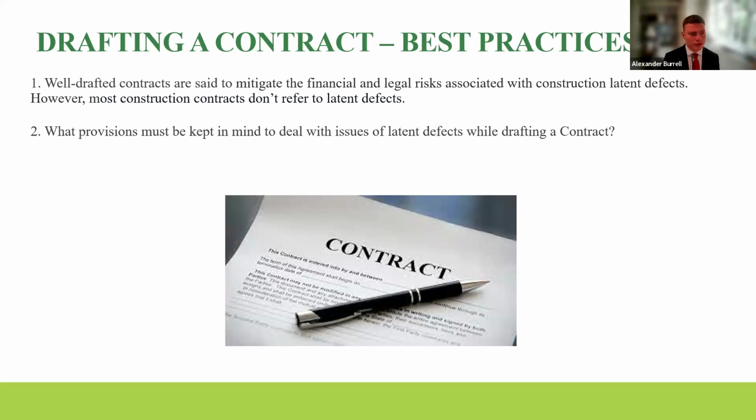Well, I'm happy to start off with one point. One of the major risks in terms of limitation and being able to get evidence in a latent defect claim is insolvency. As I'm sure many on this webinar will be aware, insolvency, certainly in the English construction market, is very high at the moment. There are thousands of insolvencies, so it's a risk that needs to be guarded against, and you don't know what the economic conditions are going to be when the latent defect arises in 5 years, 10 years time.